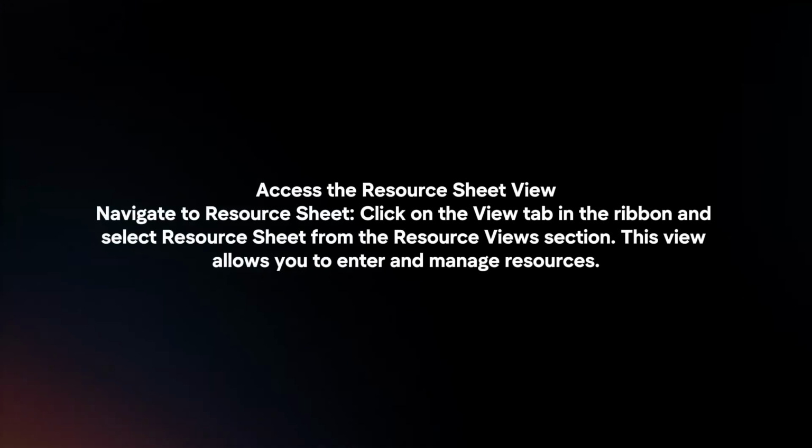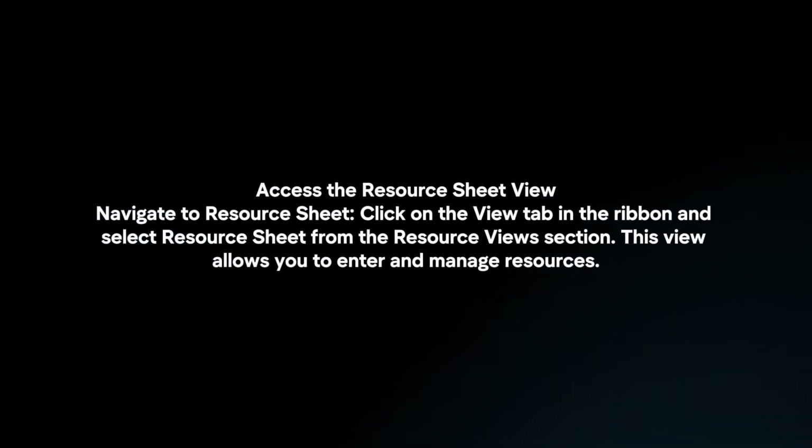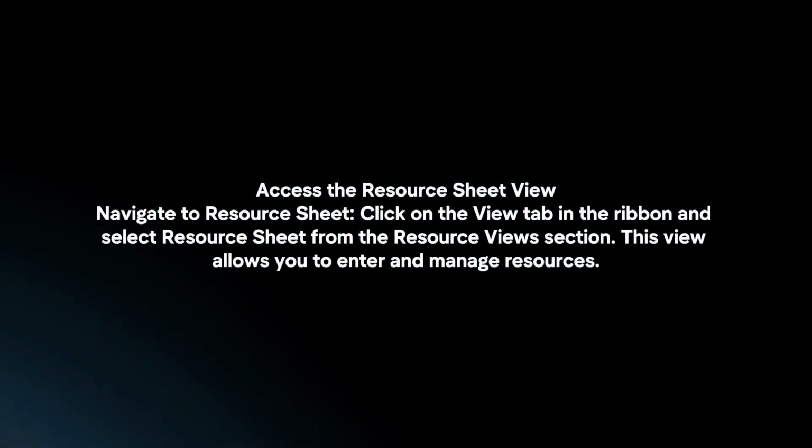Access the Resource Sheet view. Navigate to Resource Sheet. Click on the View tab in the ribbon and select Resource Sheet from the Resource View section. This view allows you to enter and manage resources.